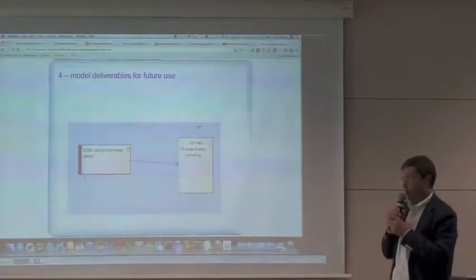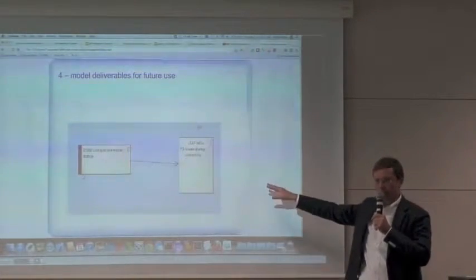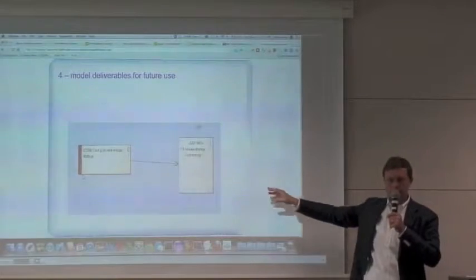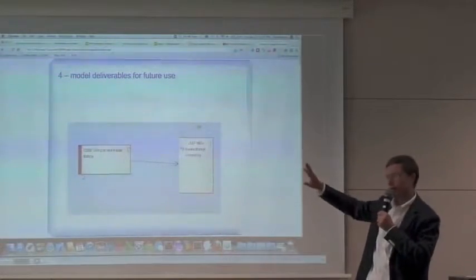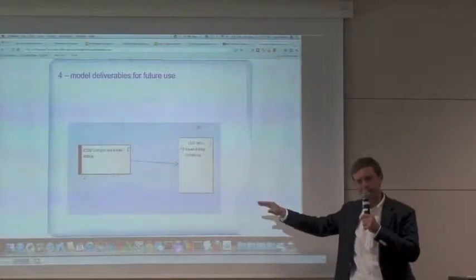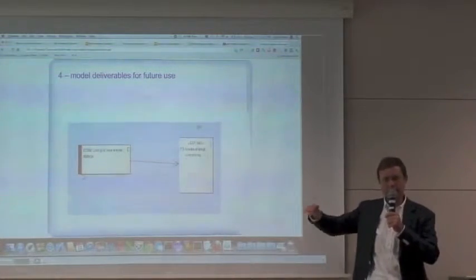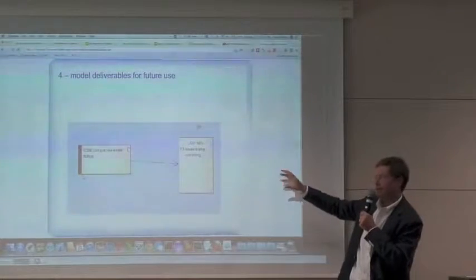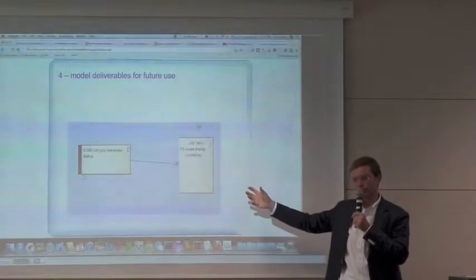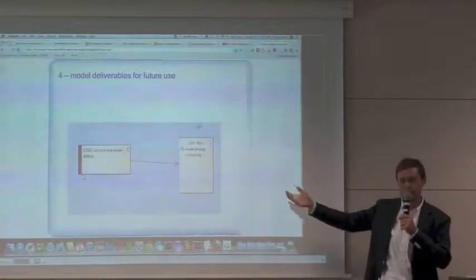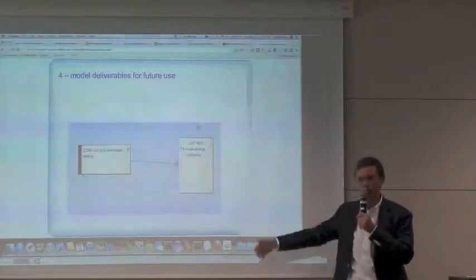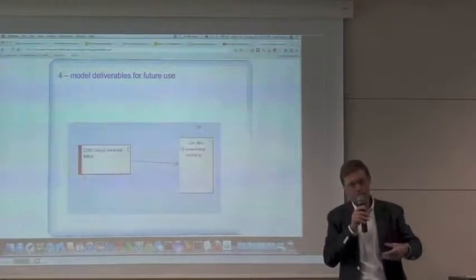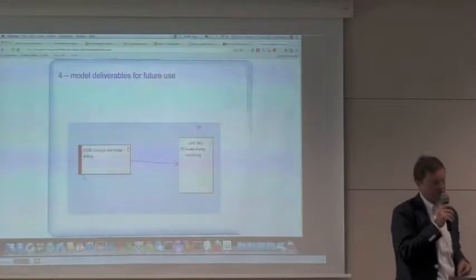During the project, we also model in the UML model all the deliverables of the project. The deliverables are modeled at a very high level. We don't replicate the workbench of SAP, but we identify only what is understood by the user, the element that the user uses: a query, a report, a new function, or a new configuration of the system or a new process.